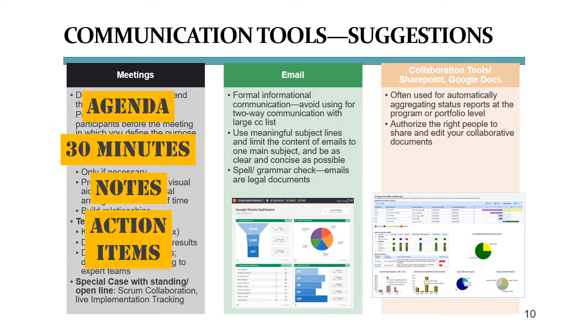So then there's email. Reserve email for one-way communication unless you want to bog down people's inboxes with endless back and forth responses. Due to the screen layout, content will soon become hidden and it's impossible to find important information anymore. Email is literally a push tool, and portals like SharePoint are pull tools, unless you set up a wiki or a Reddit or a traditional discussion board whose very nature consists of team contribution or question and answer.